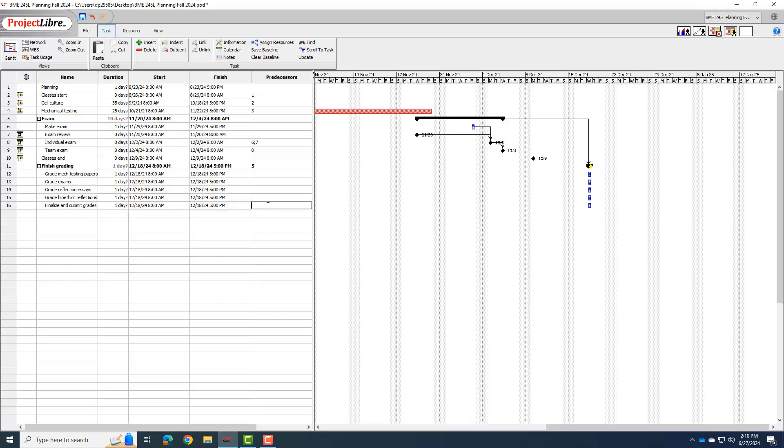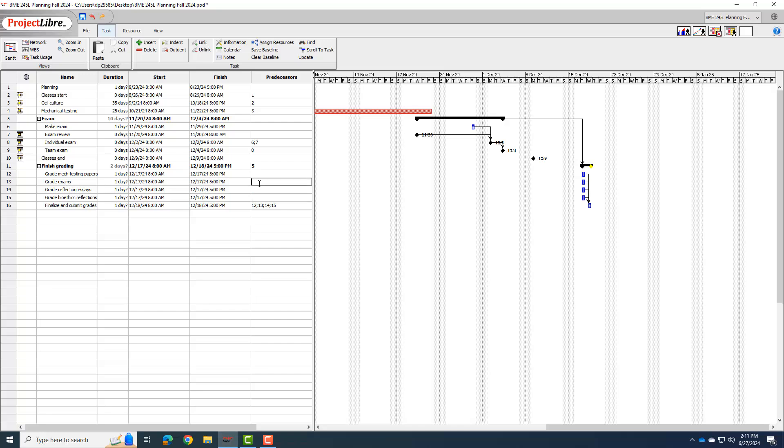So number one, before I finalize and submit grades, all these things have to be done. So I can actually just put in 12, 13, 14, and 15 all have to be done before I finalize and submit grades. So that moves everything ahead. I do have to have the exams done before I grade them. So I did have finished grading. One of the predecessor was the exams finished five. But really, it's this one, where a five, it now needs to be the team exam nine. And so I can remove this predecessor from there.